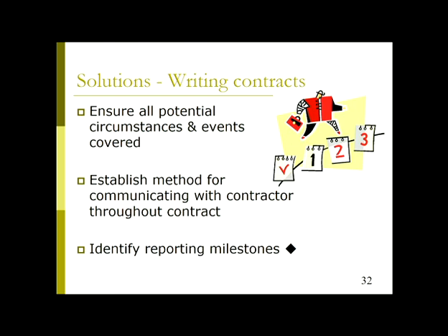And in the construction industry, if you're building a house, it might be, okay, foundations are in. After the appropriate time, we will make a payment to the contractor for that slice of work. The frame is up, okay? That's been done in a timely fashion, we'll make another payment. The roof is on, time for another payment. The walls are up, we get to lock-up stage, another payment.